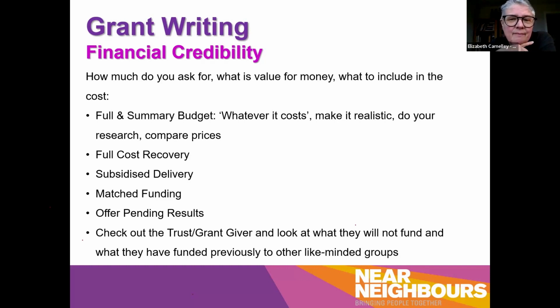Some funders are very happy to fund the full cost recovery. So if you can say, there's a contribution to management of 10%, some people are very happy to fund that, but others are not, and they don't really want to fund the costs of your organization, what we might call the core costs. They only really want to fund this particular project, so the youth worker's salary and these activities. So you've got to work out, what can we ask for? What would they fund? Some funders, like I've said, will not fund full cost.